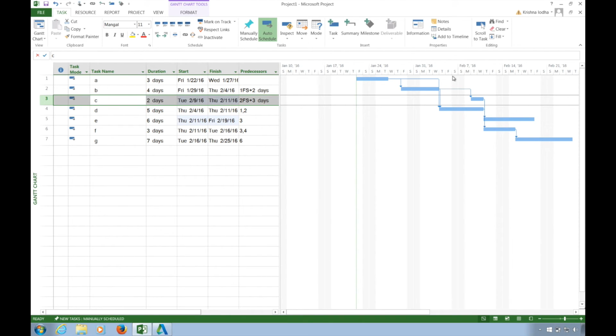This is because Saturday and Sunday are considered as default holidays by the calendar we are using currently in our project file. We will get back to it after a couple of lectures. So for now, let's assume that Saturdays and Sundays are not considered while planning. So my total lag will be Thursday, Friday and Monday.